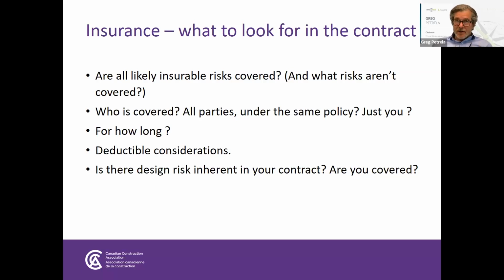So this is a tricky question. So I just have to elaborate a little bit on this. So there are two principal forms of insurance policy on a construction project that might benefit and include all the parties in such coverage. One of them is the builder's risk policy, right, that insures the building under construction. And one of them is the wrap-up liability policy that covers physical damage, injuries on a job site, a pedestrian being injured by a nearby construction accident or whatever, and property damage to the project once it's complete and turned over. Okay, so those are the two.